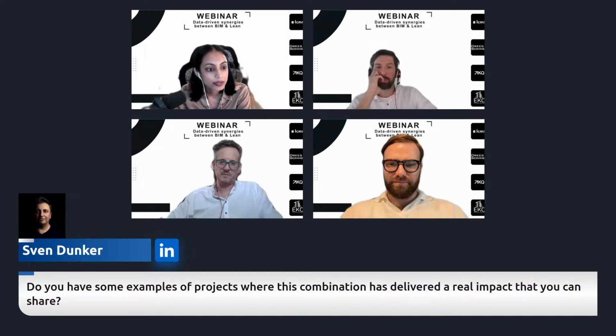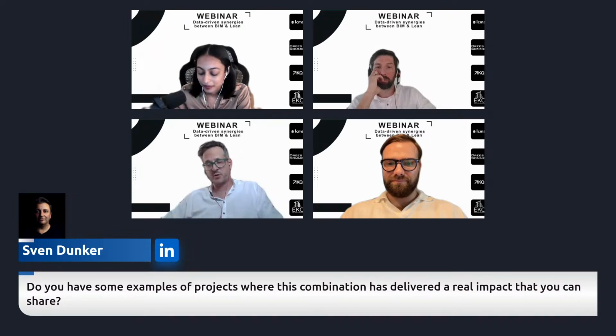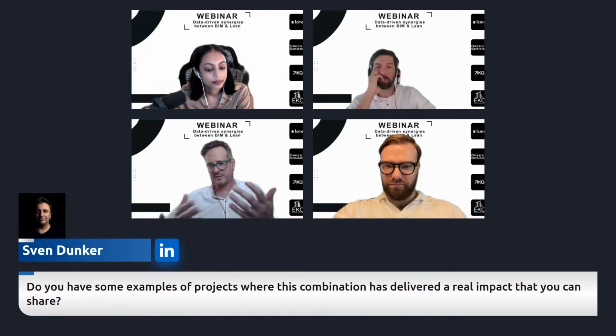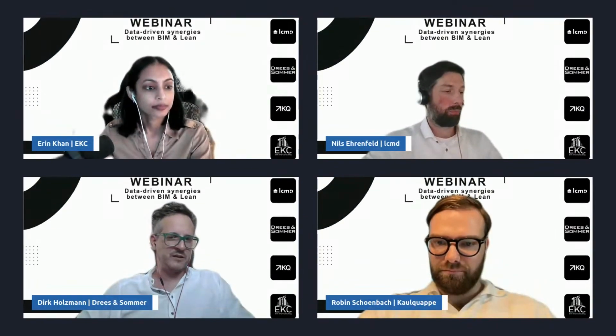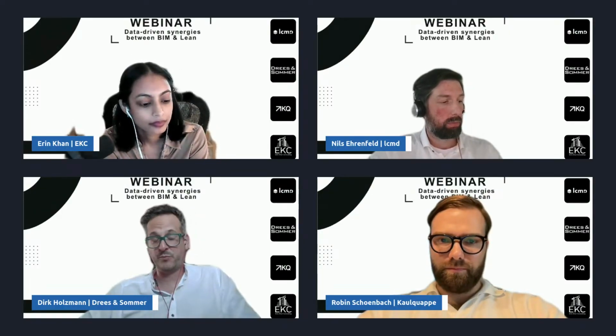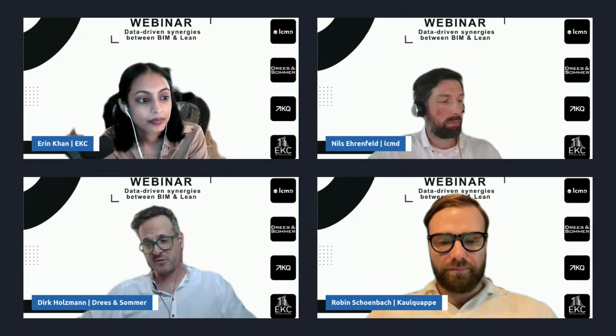Any other examples from Dirk or Niels? Yeah, we got some examples as well. One of them I have already shown. This was our first project where we combined BIM and Lean, but we have 2 other projects. Infrastructure projects are also a really good example for this combination of BIM and Lean, because the schedule is linear, so it's really easy to adapt this to a model, and they are pretty convinced by this combination of BIM and Lean.